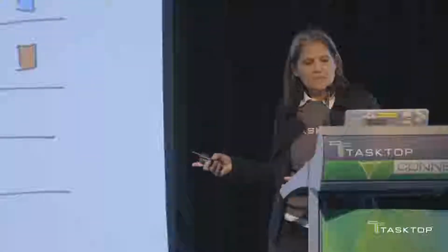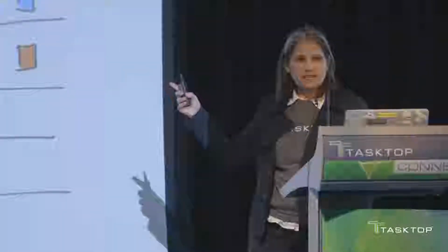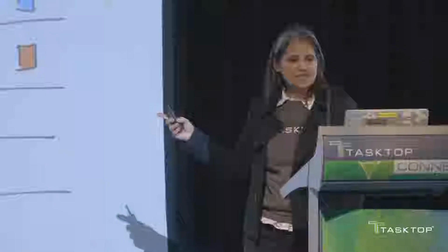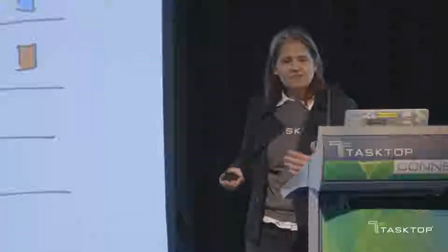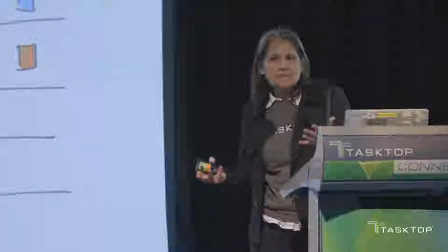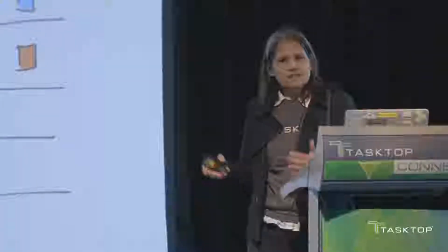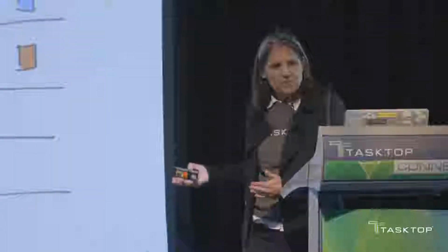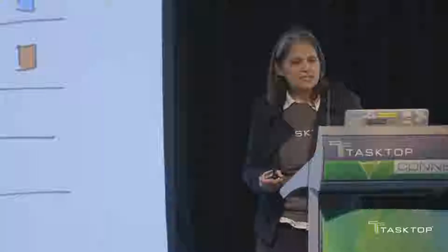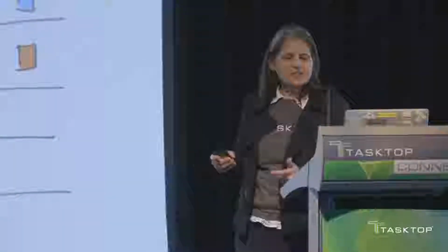So if the team has capacity to do 14 things at a time, that's what this work in progress limit says, that allows you to allocate work items based on the type of work that you want to get done. And so it helps others see the impacts of conflicting priorities across the team and the organization.